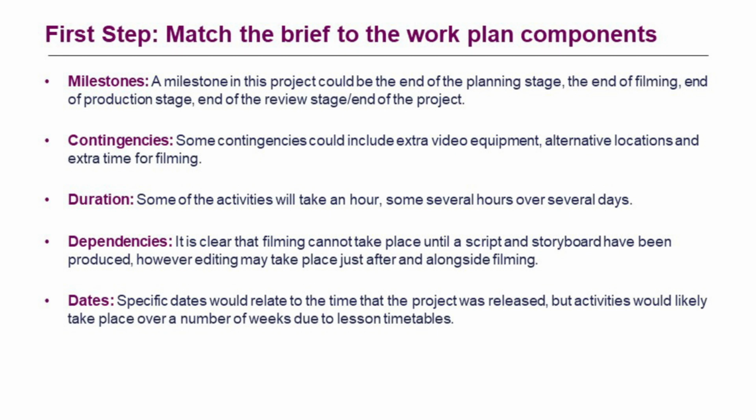Dependencies. Well, it's very clear that you can't film a documentary until the script has been completed and the storyboard has been produced, because otherwise you wouldn't know what you were filming. But editing could take place just after and alongside the filming. Once one part's been filmed, that could be edited while you're waiting for the next part to be filmed.